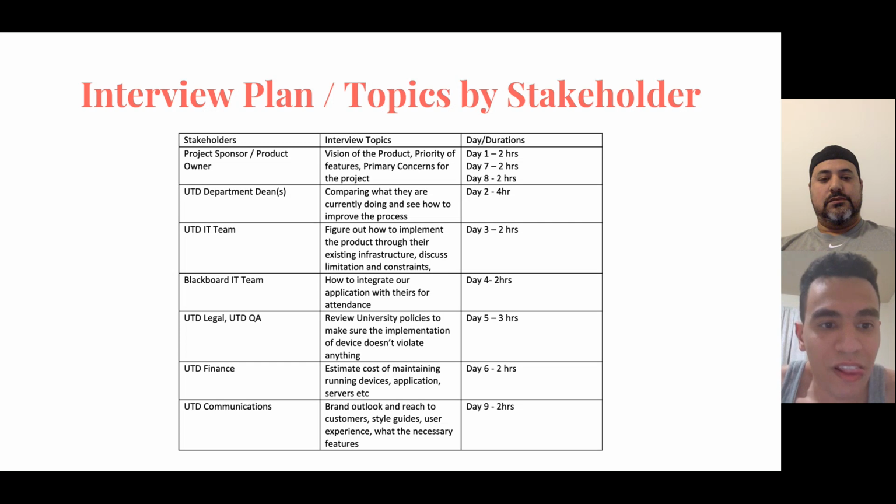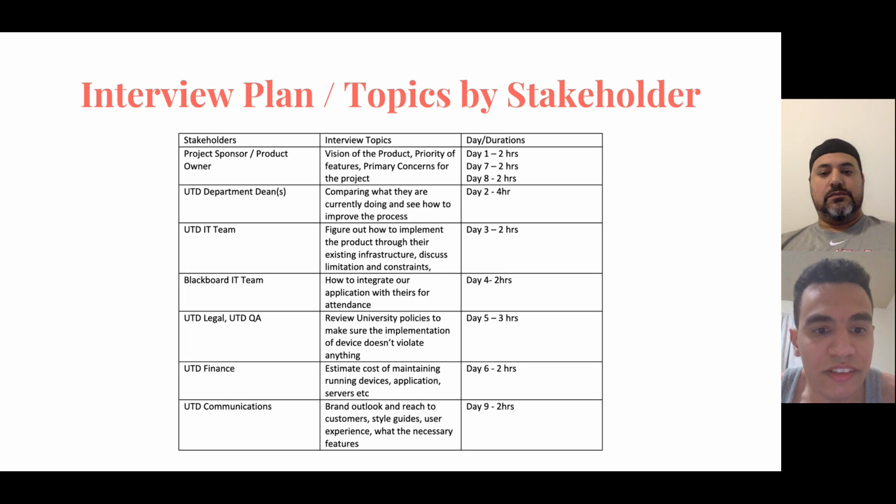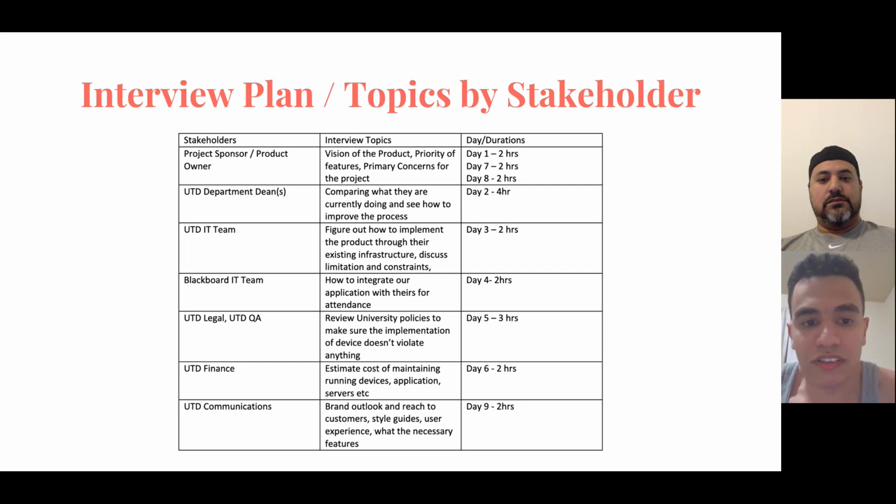Day 3, 2 hours: the Blackboard IT team, on how to integrate our application with theirs for attendance. Day 4, 2 hours: UTD legal and UTD QA, reviewing university policies to make sure the implementation of the device doesn't violate anything. Day 5, 3 hours: UTD finance, estimating the cost of maintaining and running devices and application servers. Day 6, 2 hours: UTD communication, brand outlook and reach to customers, style guides, and user experience as a necessary feature. Day 9, 2 hours.